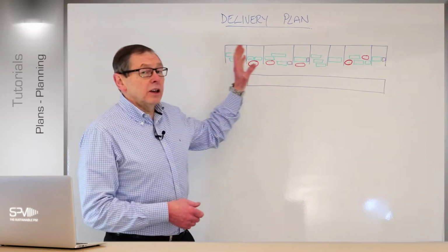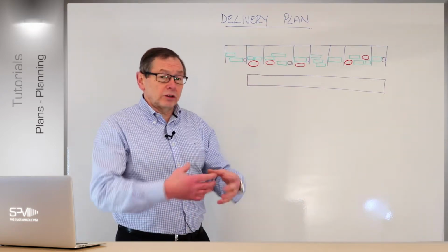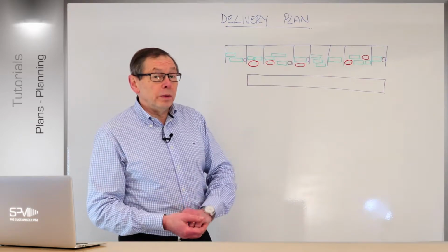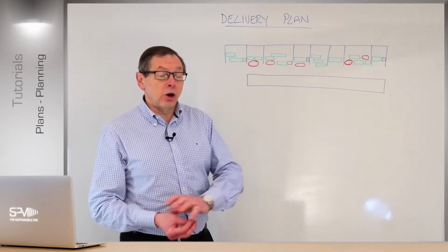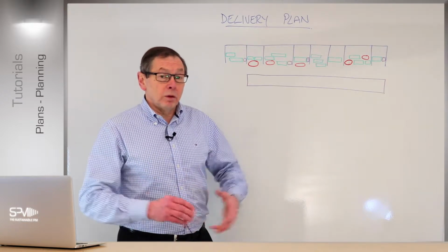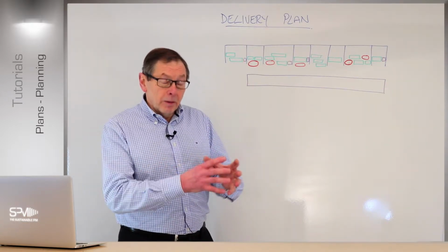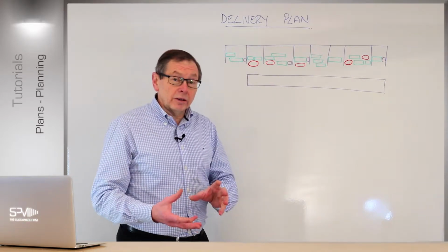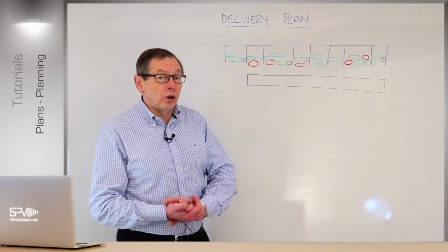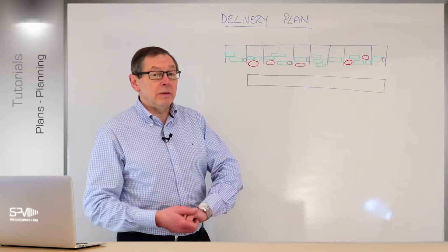Okay, so we've allocated the requirements. We need to do that because we need to understand a lot more about who's going to build them and any environments we need to have in place, so we get a better understanding of the costs and the time, and lock it in. So remember, during design, the time box needs to be a certain length. If we need to adjust it, we can do that while we're in design before we sign it all off. But once we've signed it off, we need to keep it there.